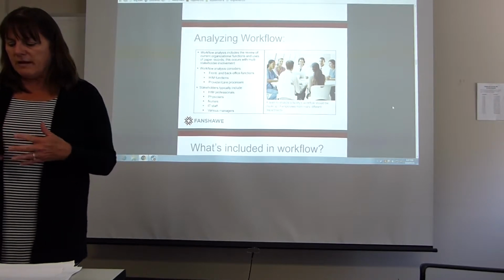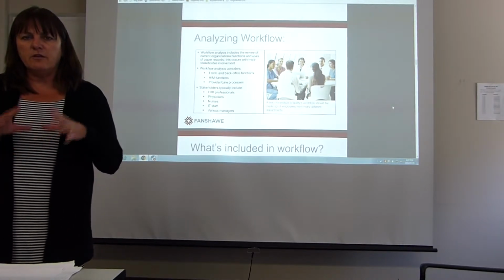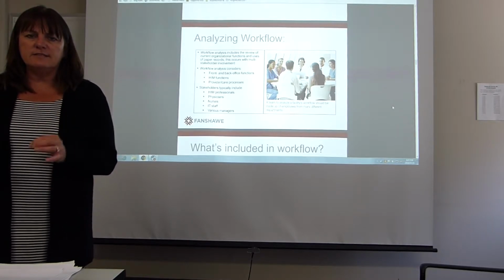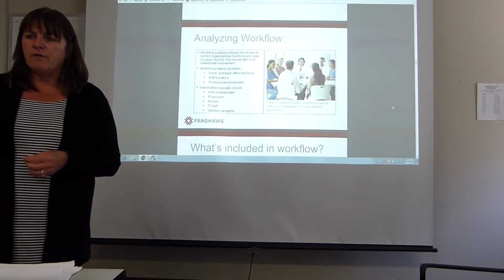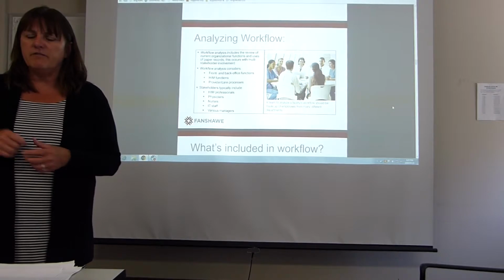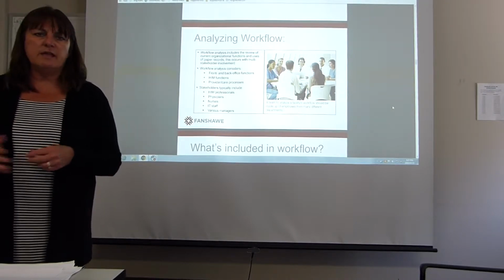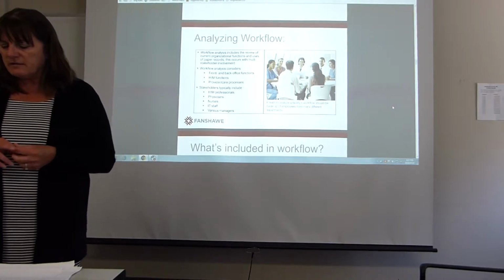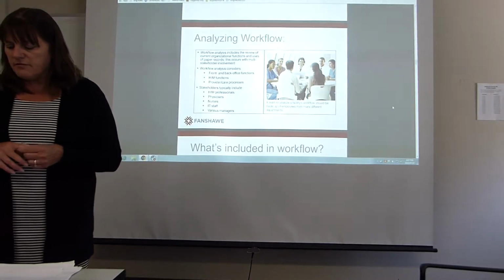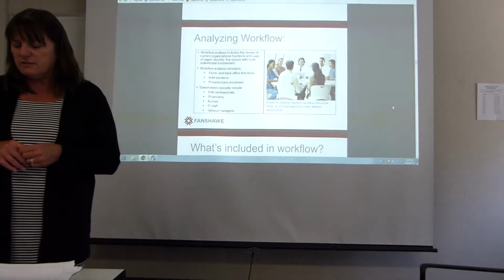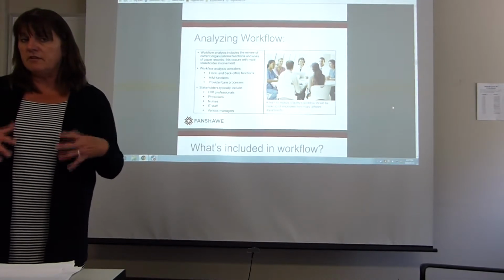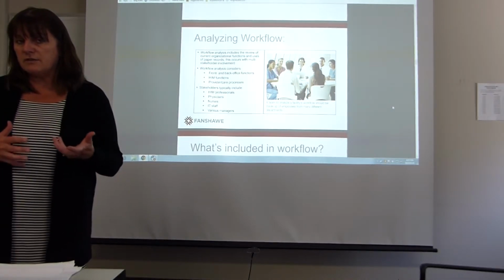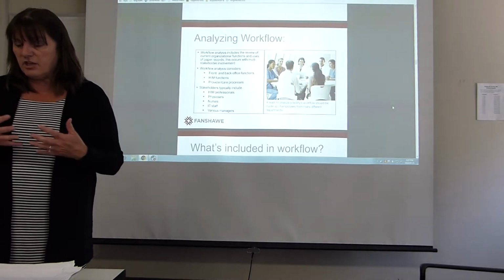So in the workflow analysis, you bring people together and you map out every single step of that piece of paper, from getting it out of the drawer or pulling it off the shelf, right to the very end, perhaps filing it back in the chart. It's called a workflow analysis, and it involves the front end and back office functions. So the front end, if it's a family doc's office, would be the medical secretary who might initiate the paper.